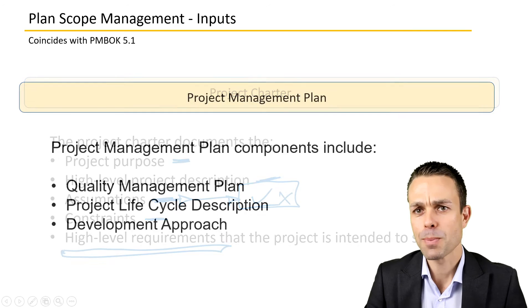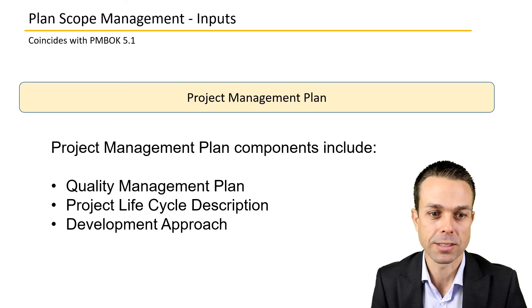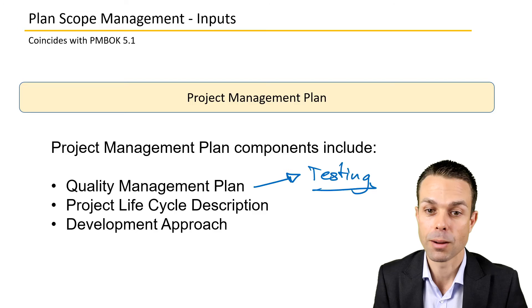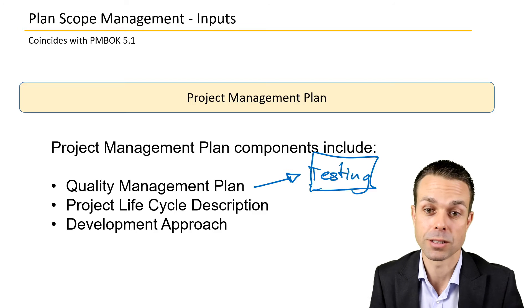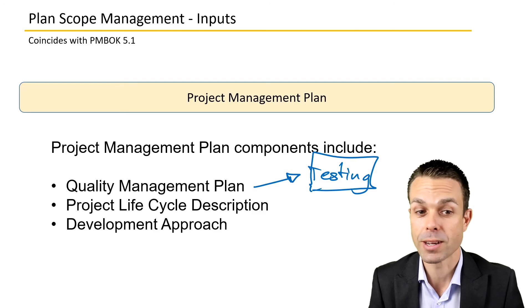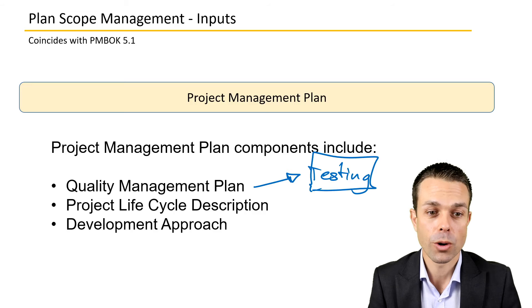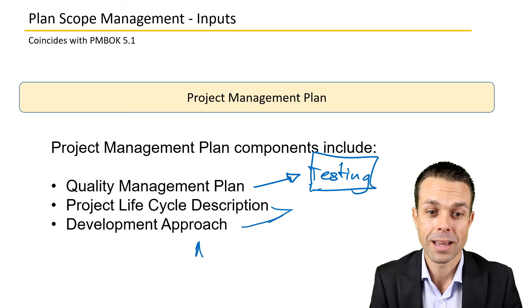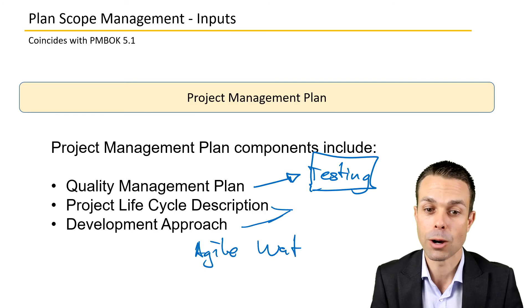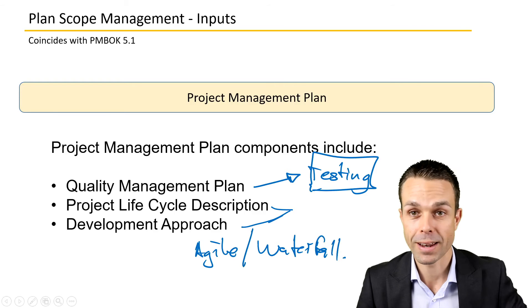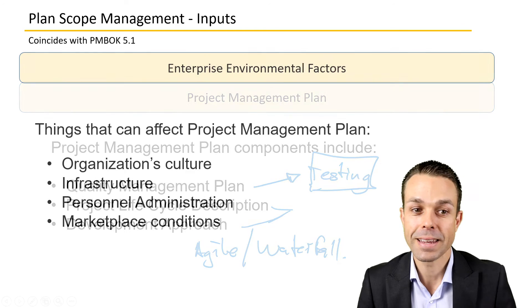We also need any constraints and high-level requirements outlined in the project charter. The project management plan itself is an input, including the quality management plan — covering how our scope testing went, whether it passed, and whether there were defects. We also need the development approach and project life cycle description: are we using agile, waterfall, or a combination? That will affect how we move forward.